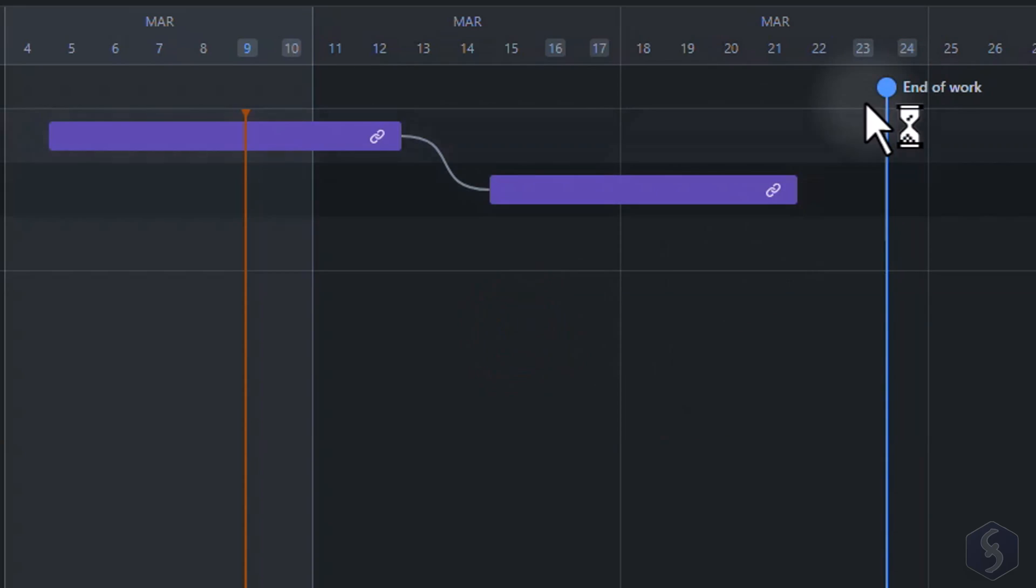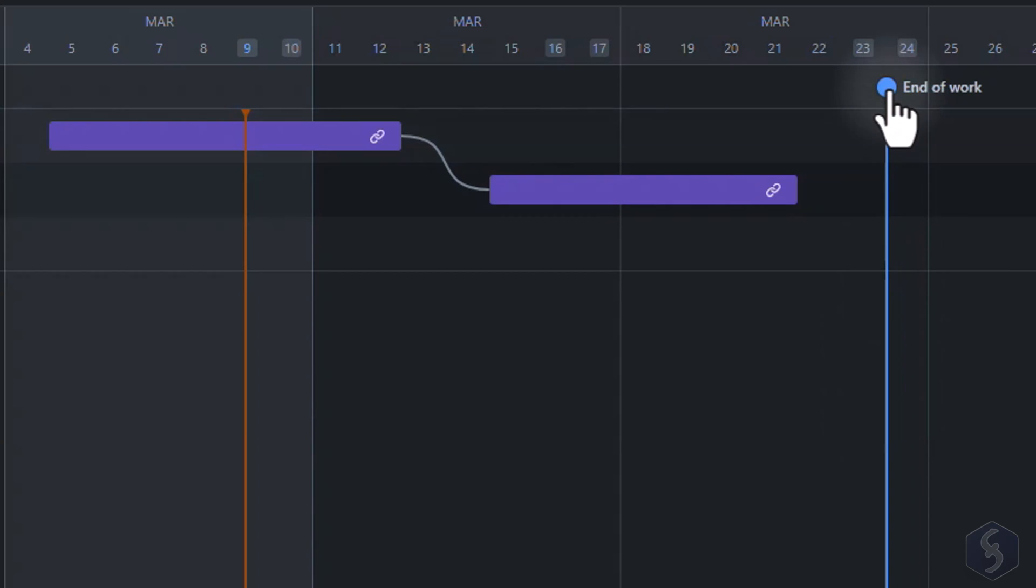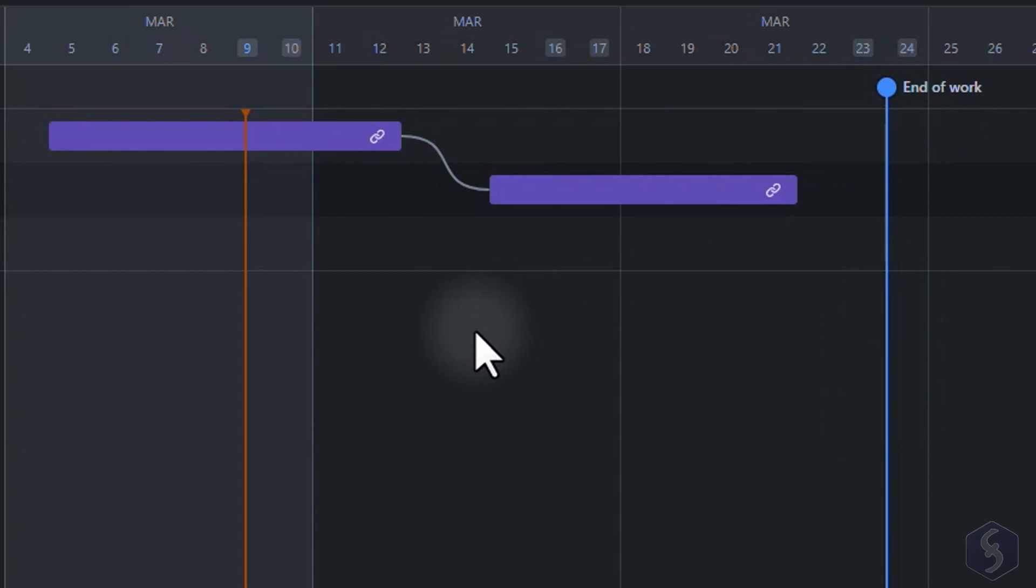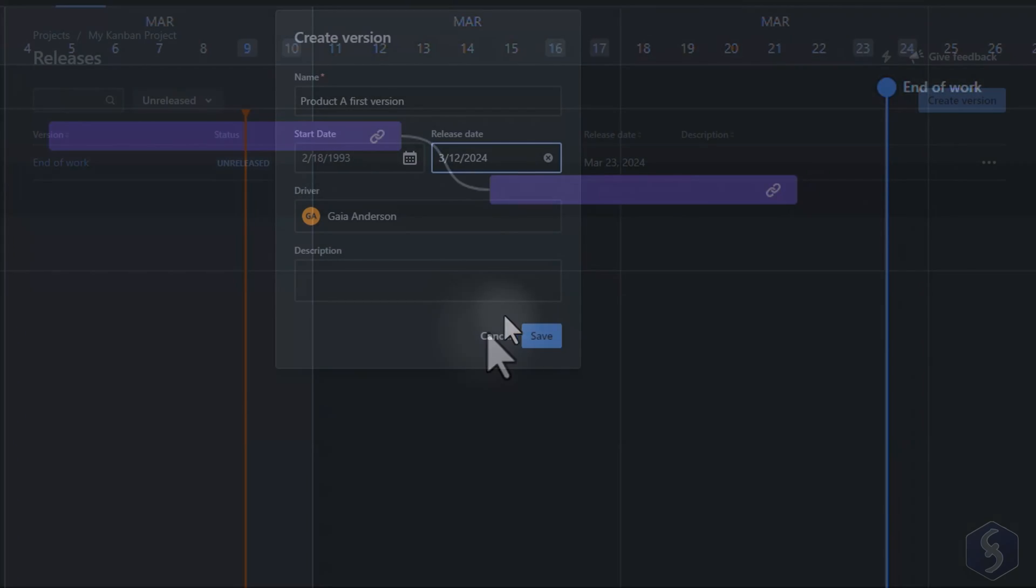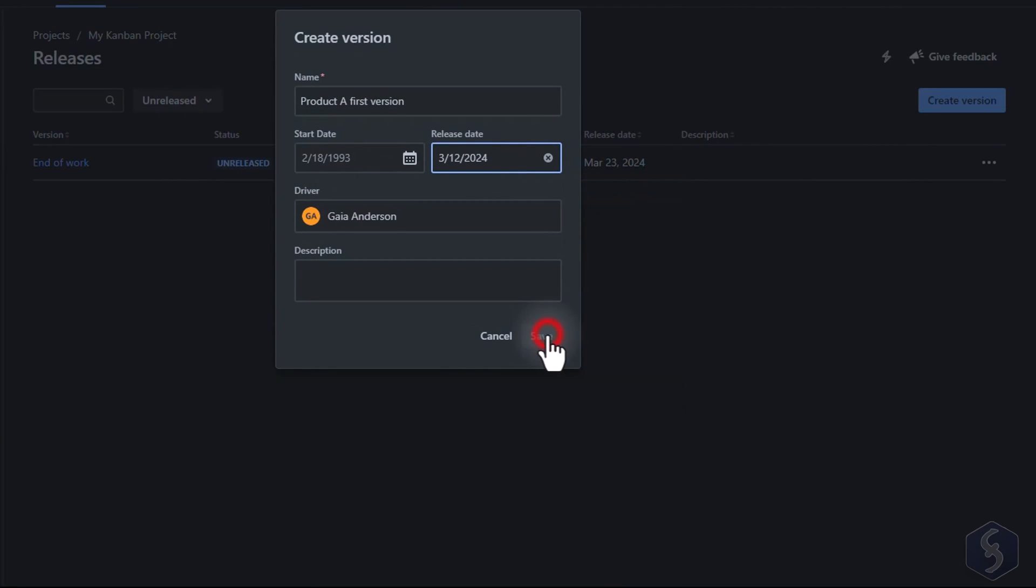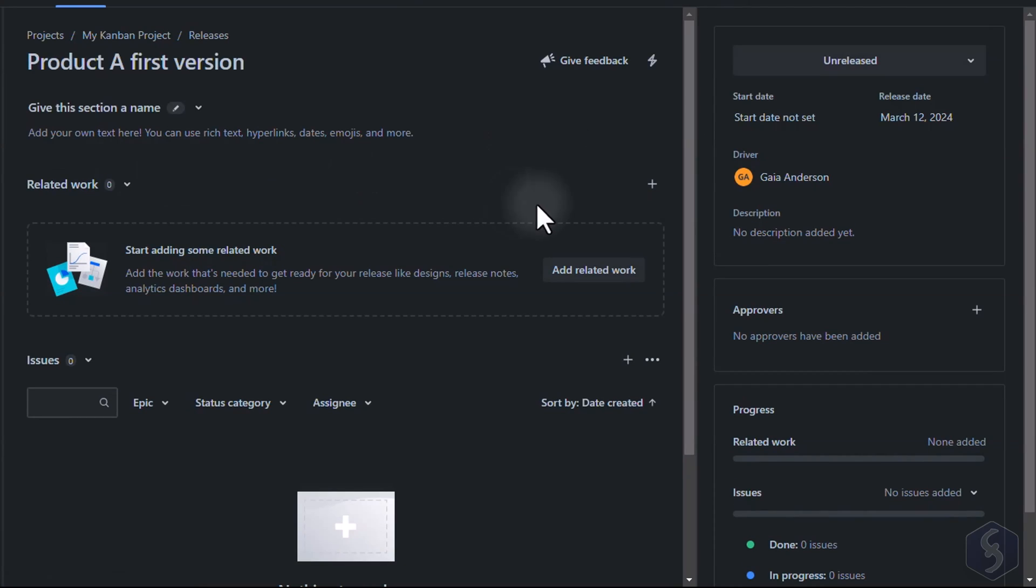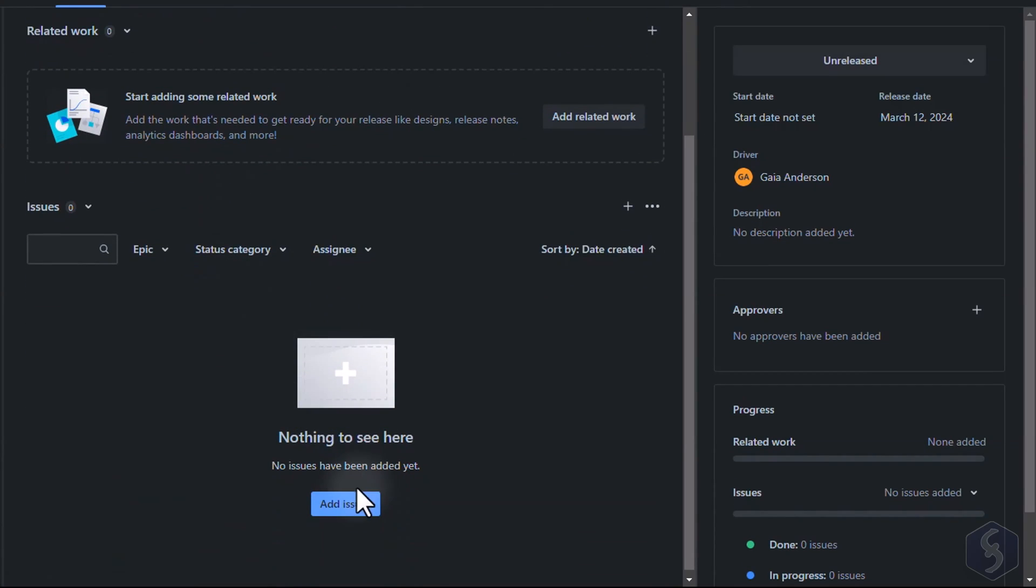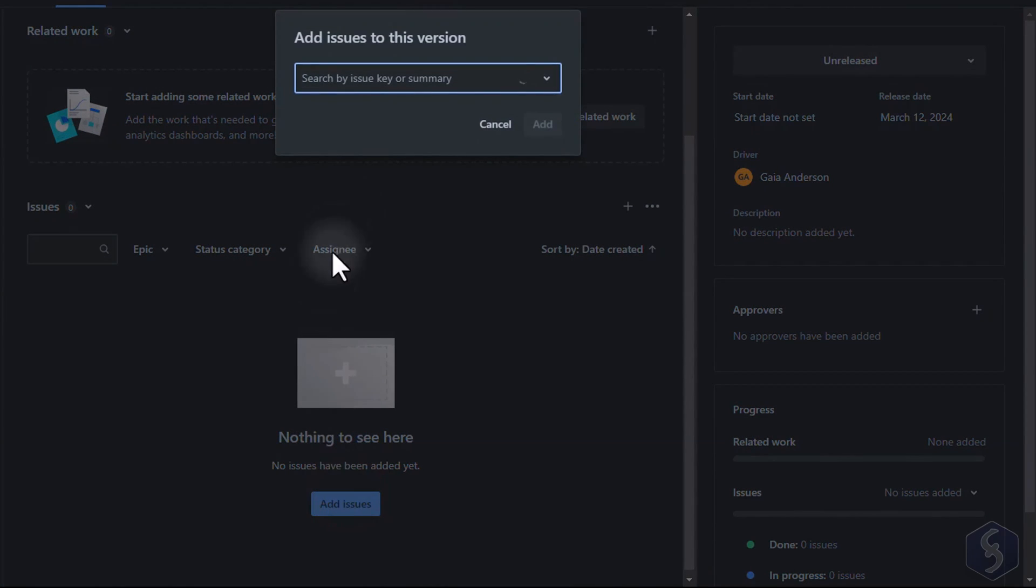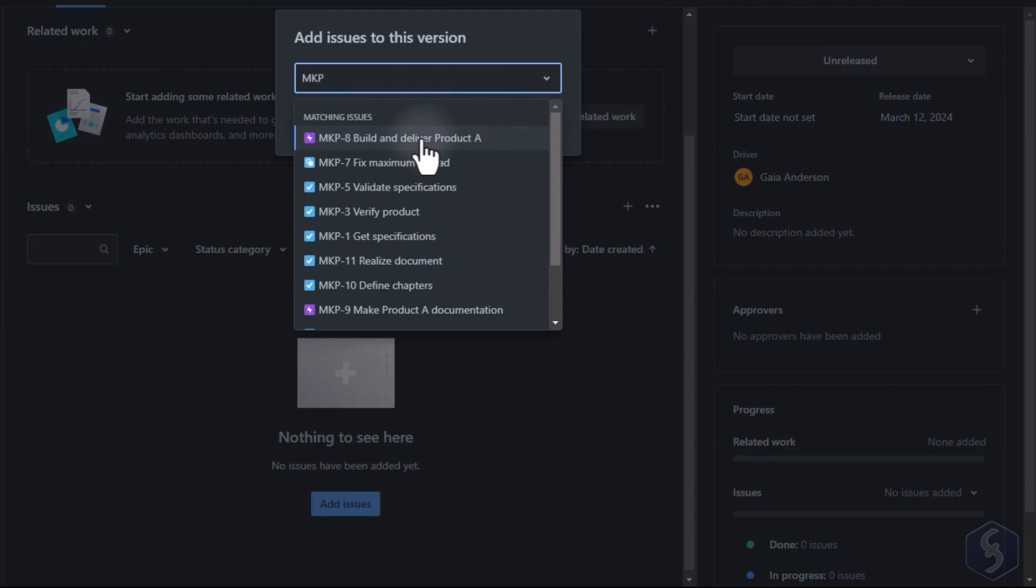As long as the version item does not include any issue you can use it to fix a general milestone, whereas if it is intended as a project version you can click on it and assign the issues to be resolved within its release.